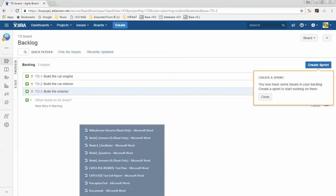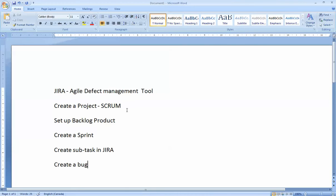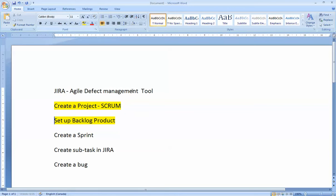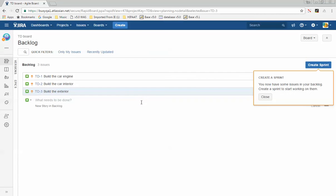The next thing that happens in a scrum lifecycle is we have to give a story point to each story. The story point is the amount of time it's going to take the team to work on a story. As I mentioned in class, the story point is a measure of time.